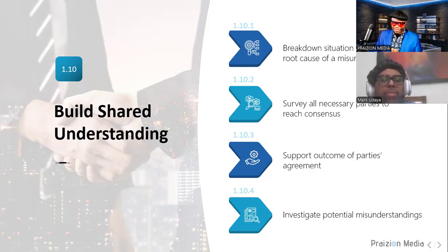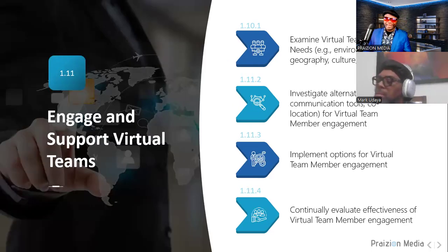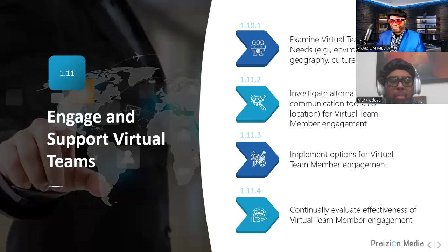Two concepts. Okay, let me continue. So part of a daily scrum quagmire could be what do you do if the team is geographically dispersed? That's why you have tools that you can use for your daily scrum, right? Thank you, Mark. Mark got the second one, which is the one I was interested in. It's not just the three questions, it's walking the board. Thank you, Mark. Good job.